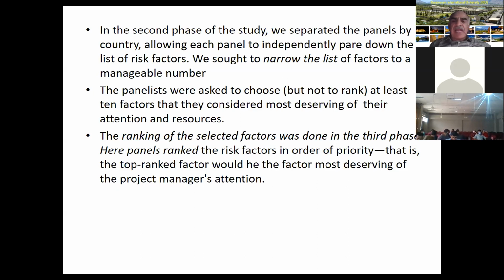The ranking of the selected factors was done in the third phase. Here the panel ranked the risk factors in order of priority, that is, the top ranked factor would be the factor most deserving of the project manager's attention.